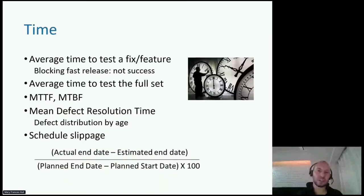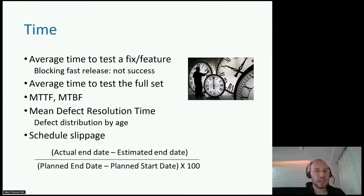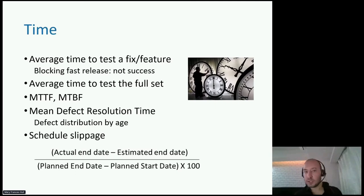After these best practices, let's see what categories of metrics we might have in our monitoring activities. First, the time-related metrics, because time is precious and one of the pillars of project management. Most of the time, we are trying to schedule our activities — by what time we can start or finish. How much time do we need to perform specific tasks? Because otherwise we may be late, behind schedule, and may have to pay some penalties due to delays. Continuously tracking metrics and applying lessons learned — like how much time we consumed in past cycles for full test set execution — helps us schedule future cycles in a healthy and consistent way.